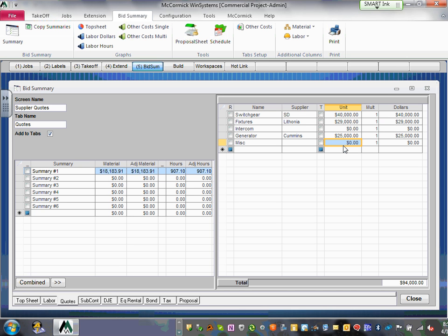Put Q next to it, which means erase the price from the software, use this price, and assign only labor. Does that make sense? So all your fixtures, guys, you still have to count your fixtures because of the labor. The price is already here. So, okay, we got these 25. I'm going to type this instead of data equipment.